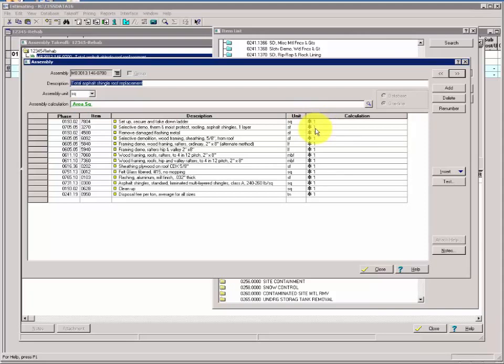Now in the manual we have done the conversions for you to convert to all the various takeoff quantities that you're going to need. Sometimes you need square, sometimes you need square feet. And sometimes you'll need to make a proportional calculation that calculates a reasonable number of lineal feet based on how many squares of your project. Now these are ratios, with the idea being that we're just trying to generate costs to remove and replace some of the framing elements.